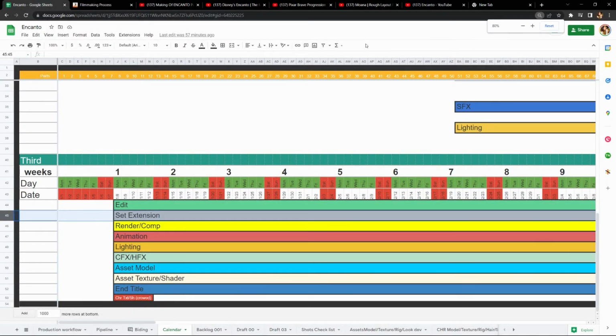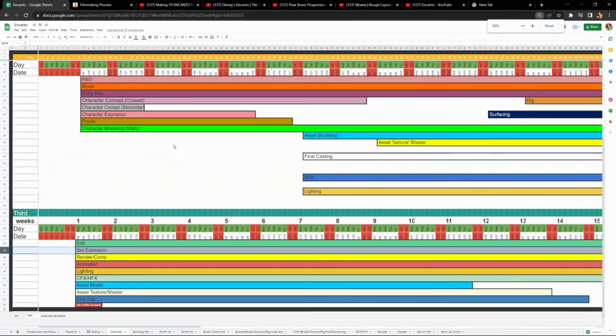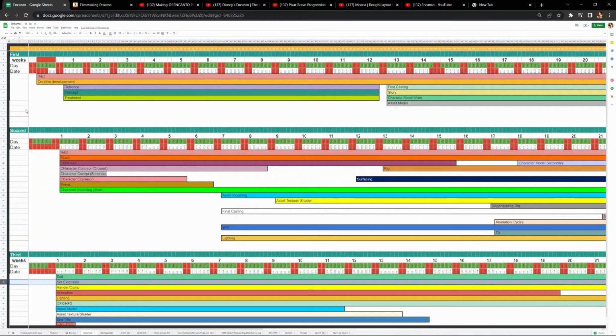Do you remember the overview I showed? The next thing was the calendar. You should make your own calendar based on working and non-working days, and then add the crew calendar beside it. You will see which teams are going to work at the same time. It makes you capable of answering questions like how many rooms and systems you need. You would send a list of demands to recruiters to help you find a network and so on.